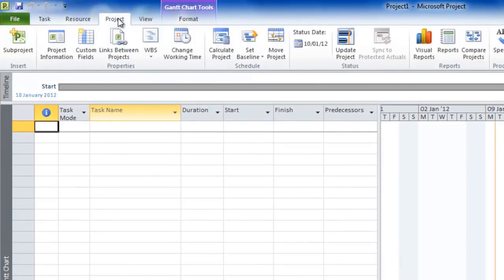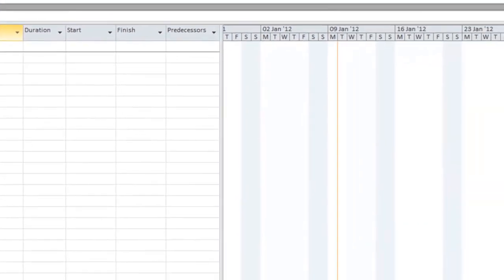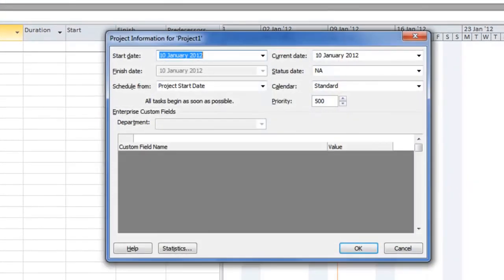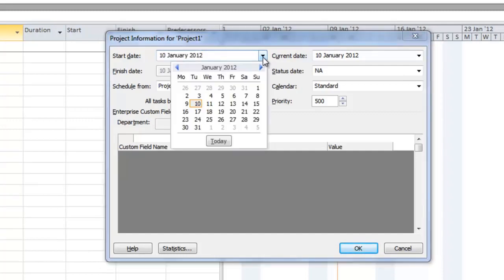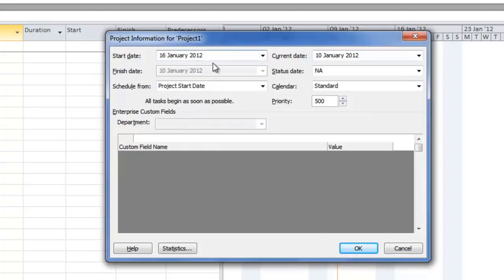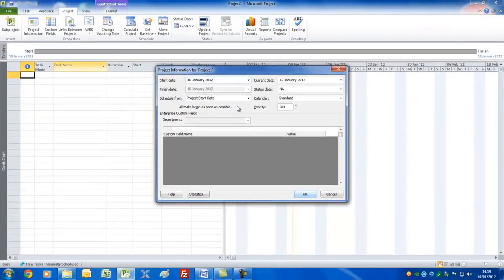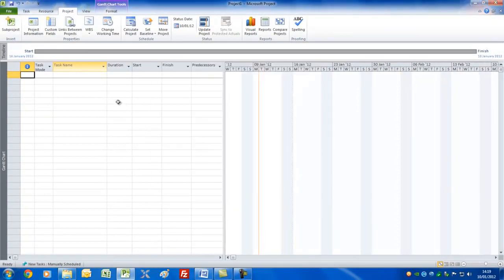The first thing you'd want to do is set up your basic project information. For this reason we go to the Project tab and Project Information. Today's date I'm recording this is the 10th of January. I want to set the start date to the 16th of January, just to show you that you can adjust this for some point in the future.